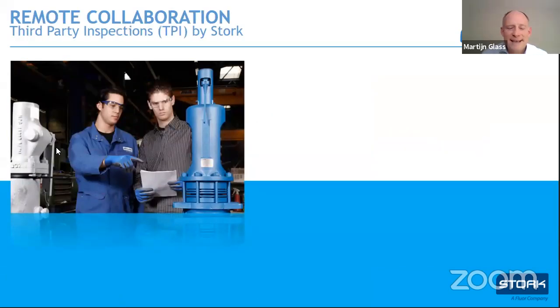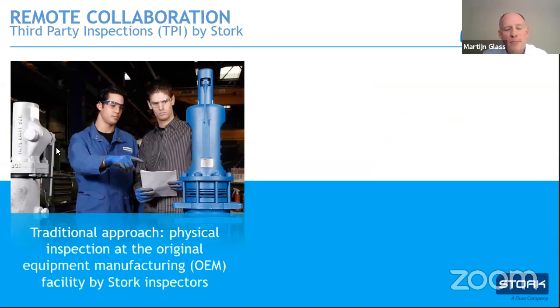Moving to the last case, this is not something related to technicians. It's a third party inspection. And I thought we'd be remiss if I didn't mention this. For those not familiar with third party inspection, or TPI in short, this is where the EPC contractor wants to have a third party inspection of equipment at a manufacturing site before it gets shipped to site. Traditionally, Stork will source inspectors who live close to site to physically travel to that manufacturing site, and to witness, for example, FAT tests, factory acceptance tests, check documentations and certifications, and measure to verify measurements and the like.